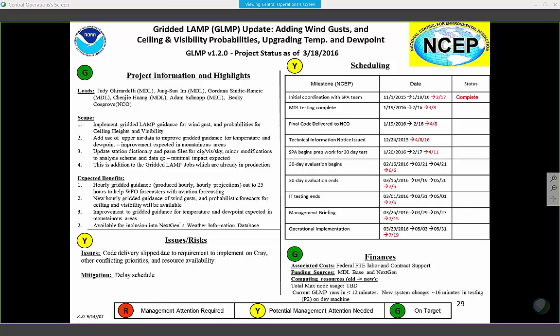People are using each other's stuff, and you can't necessarily expect another group to port their thing on your timeline when they're interdependent. So it's the way we decided to spread the suite across the three components, that we weren't moving DCOM, we weren't moving the tanks ahead of time. But we need the flexibility to do that, obviously, because eventually those machines go away. Yeah, oh, absolutely.